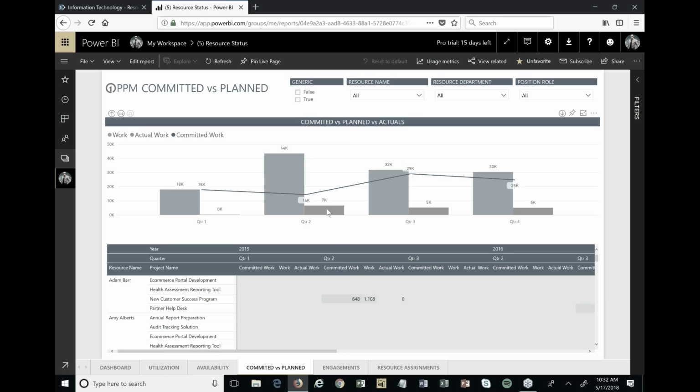This particular report starts to get into some of the data that you'll get later on as we actually execute on these projects. For example, I mentioned timesheet data or actual hours that are being spent on this work. What this is showing me is up front, I built my resource plan. That's this dark blue line here, the resource plan that we showed we built earlier. This was my initial estimate. Later on, I might build a more detailed project schedule, and we can call that our forecast. And that's this blue line right here. Whoa, it's twice as much, in this particular quarter anyway. So obviously up front, we either didn't plan enough resources, or when we're doing our project schedules, we're padding things way too much. So there's a gap there. We need to figure out what that is. So this can help us see how good we're planning.